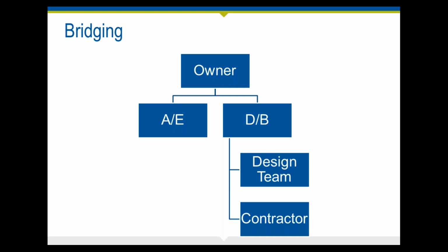The reason this is important is that lenders occasionally will not accept an affidavit or certification of a design build professional of a firm that's been working under the design builder. So they want to see the involvement of an independent design professional.